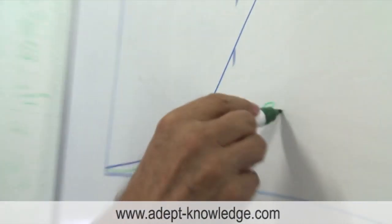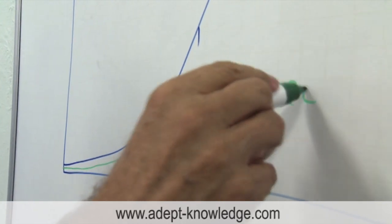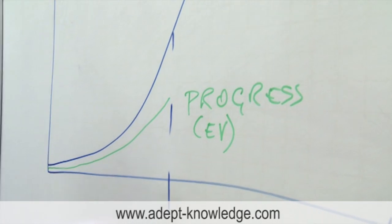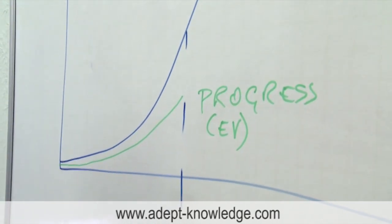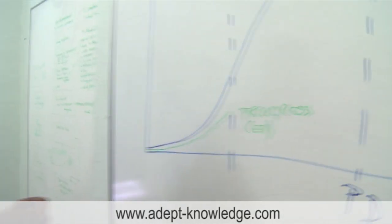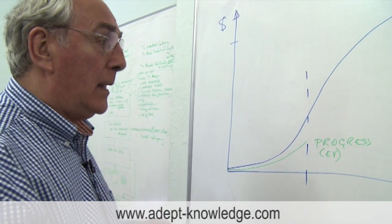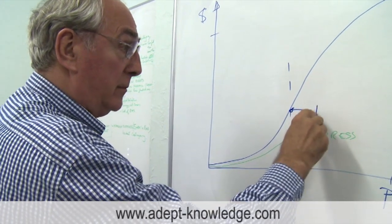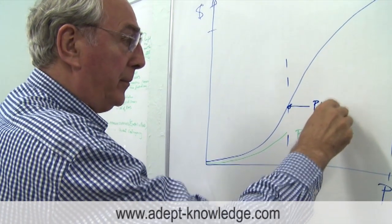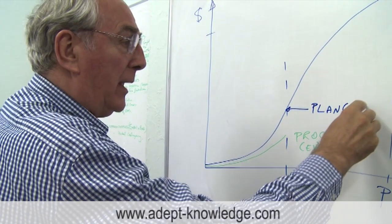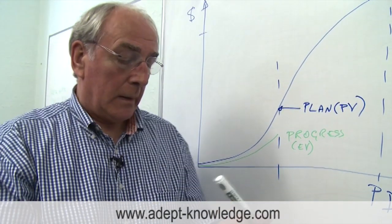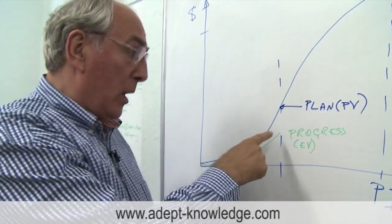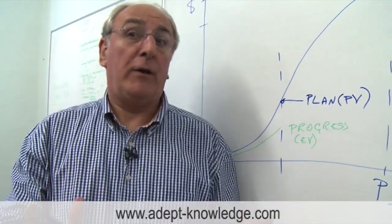That progress is technically called the earned value. But that's the physical progress on the job but measured in budget terms. Pretty important but a vital thing to do. We compare that with this point here on our baseline which is, if you like, our plan. That's sometimes called the planned value. I'm just putting PV there. So we immediately know this is where we are in relation to where we plan to be. That's pretty vital.